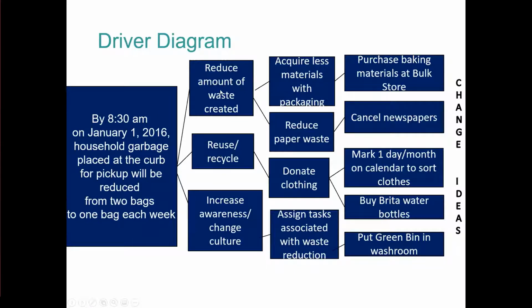The primary drivers for this particular project are to reduce the amount of waste created, reuse and recycle, increase awareness, and change the culture. If we move over to the secondary drivers, we will have things like acquire less material with packaging, reduce our paper waste, donate clothing, assign tasks associated with waste reduction.